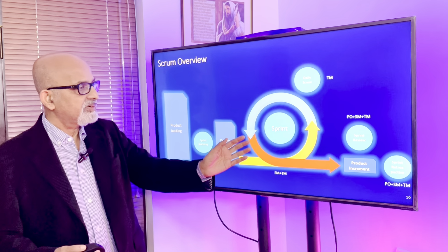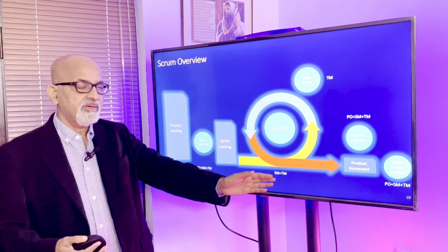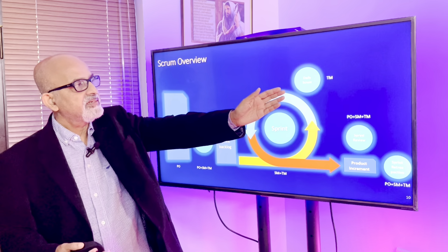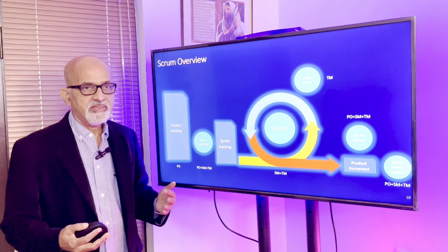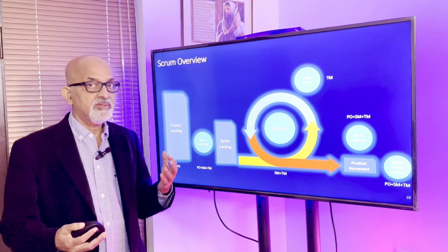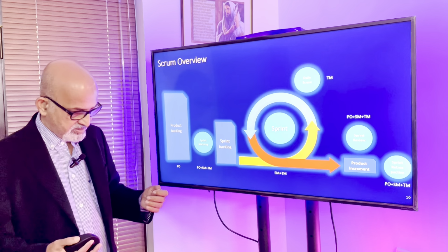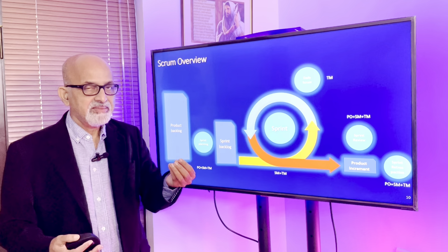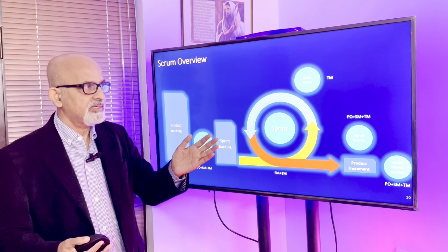It's the self-organizing team. They start building the feature during the sprint, and the Scrum Master is there basically to help the team remove any impediments they are facing. And every day there is a daily team meeting, which is known as daily Scrum. There is a 15-minute quick meeting where each member of the team says what did I do yesterday, what am I doing today, and what are the challenges I'm facing. So this is shared by the rest of the team. In this quick 15-minute meeting, each team member will get approximately 1 minute or a maximum of 2 minutes. We're talking about 10-member teams.